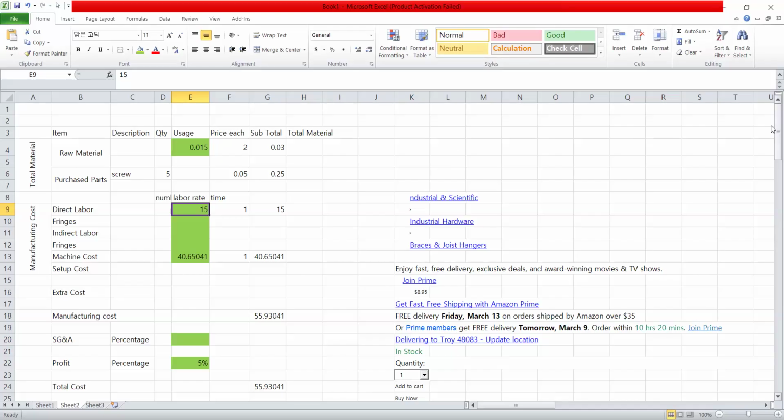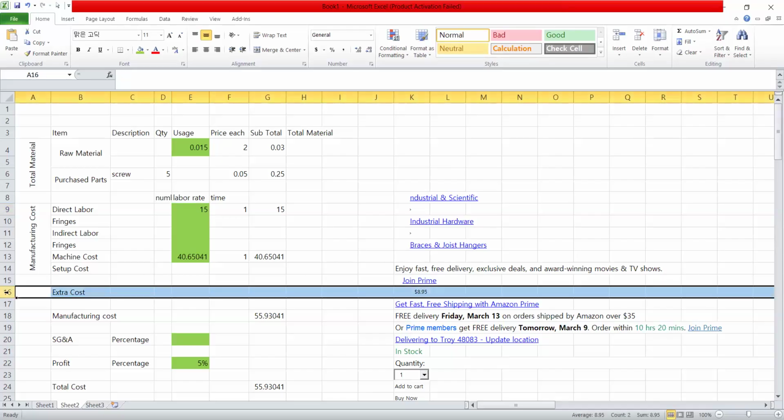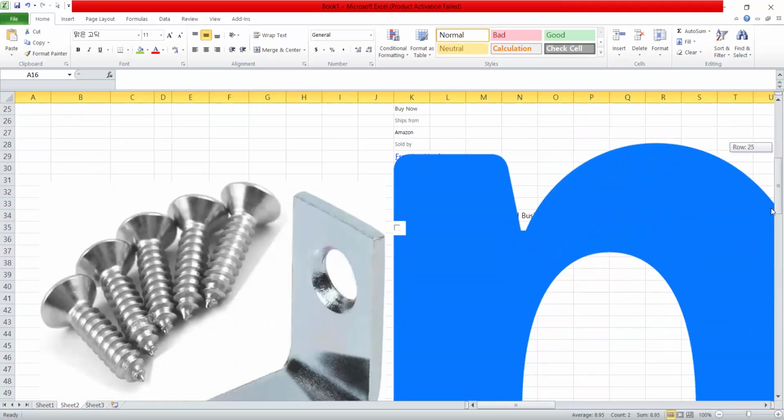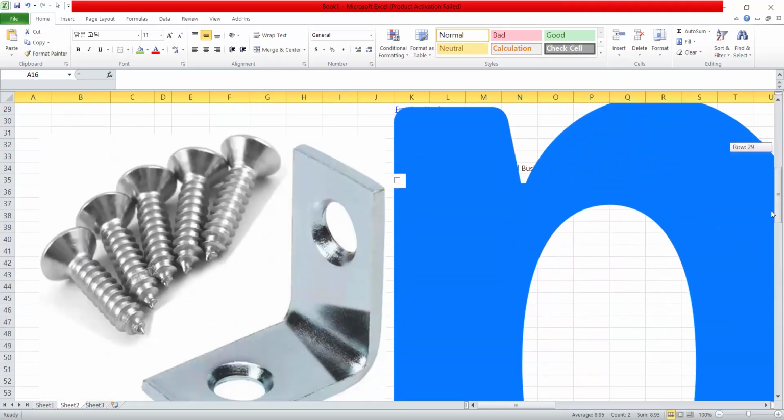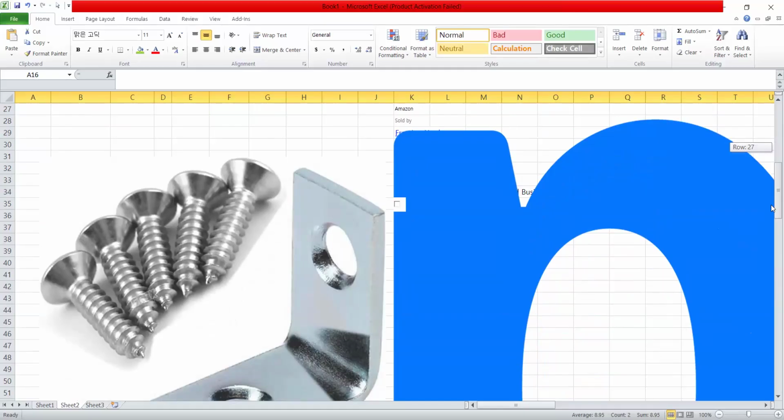The only thing I want you to also consider is the scrap. When you do the manufacturing cost, please add the scrap. Normally, scrap for each operation will be added. For example, when he showed the L bracket with the screw, there are three basic processes. You do the first punching to make the shape, to cut into this straight portion. Then you have a scrap of 1% there. Then you have a bending operation. Sometimes it is combined, cut and bend together.